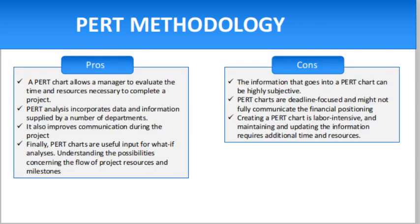A PERT chart is similar to a critical path analysis, another method that project managers use to chart tasks in a project. The main difference between the two is that a PERT chart uses various time frames and probability terms when estimating each project stage.